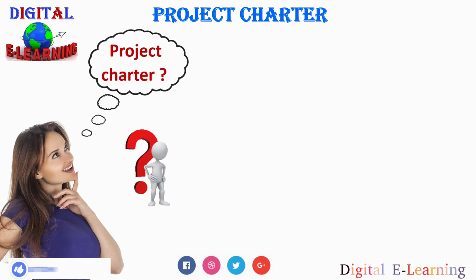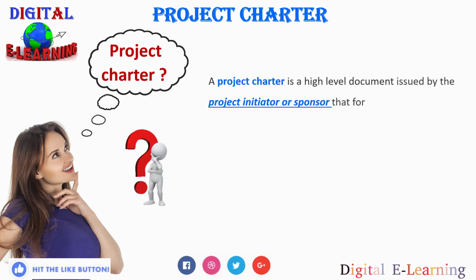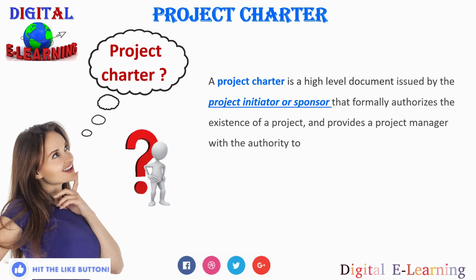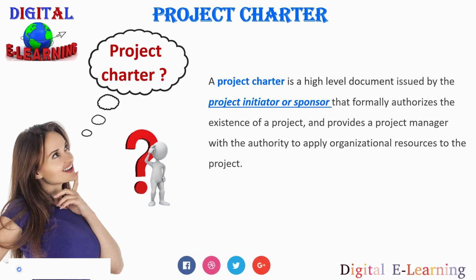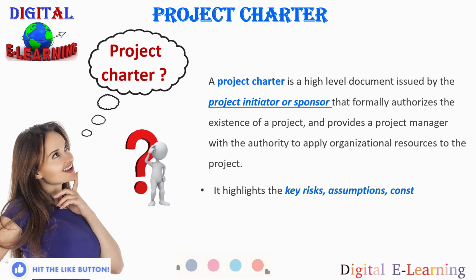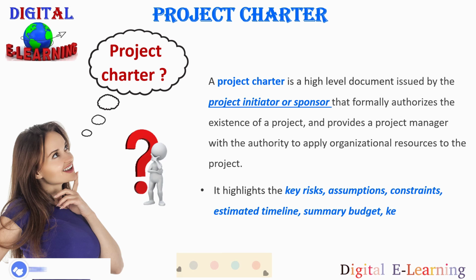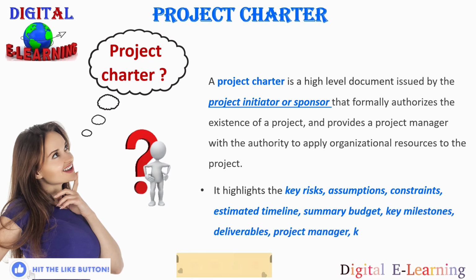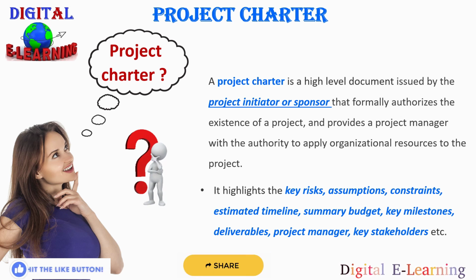Project charter. A project charter is a high-level document issued by a project initiator or the sponsor that formally authorizes the existence of a project and provides a project manager with the authority to apply organization resources to the project. It highlights key risks, assumptions, constraints, estimated timelines, summary budget, key milestones, deliverables, project manager and the key stakeholders.